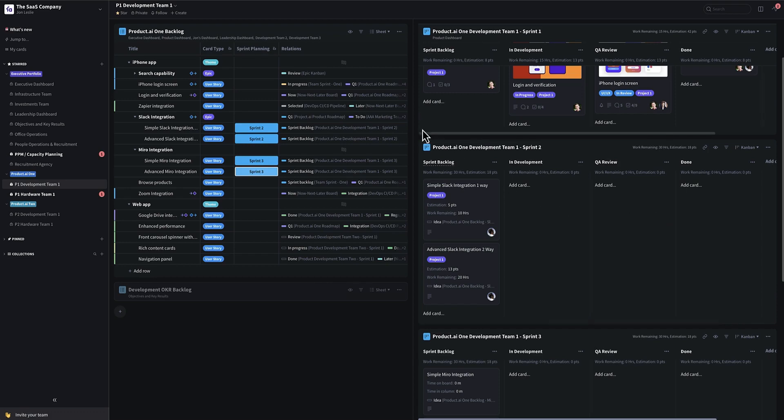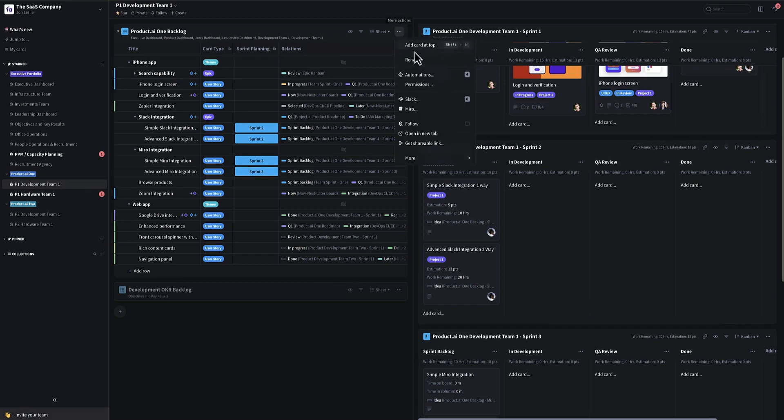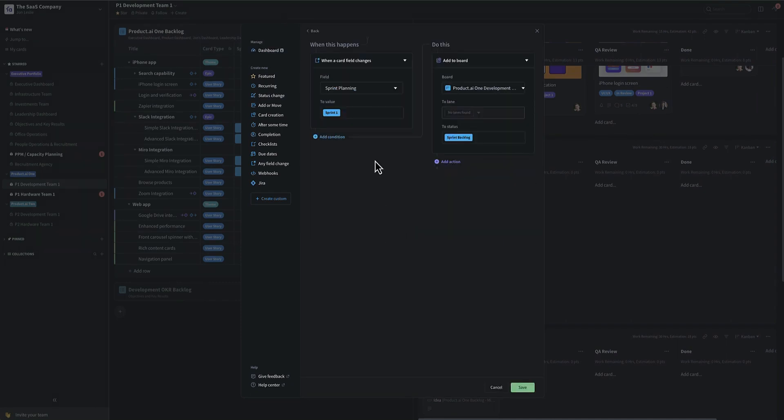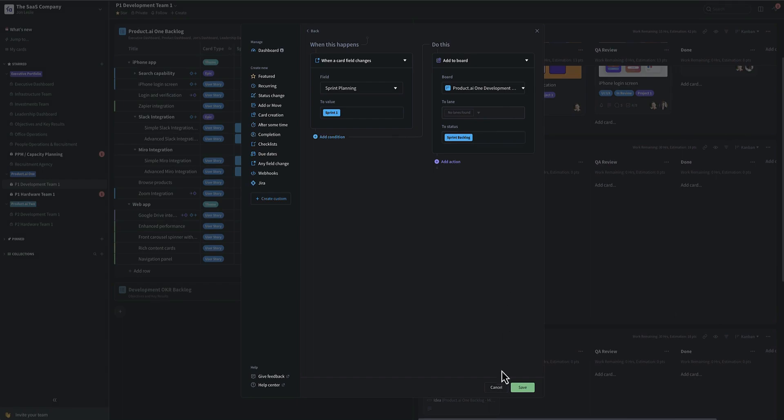Now the automations to do that were very simple. Just one per sprint saying when a card field changes to that particular sprint, add it to that particular sprint board to the sprint backlog column. And that's it.